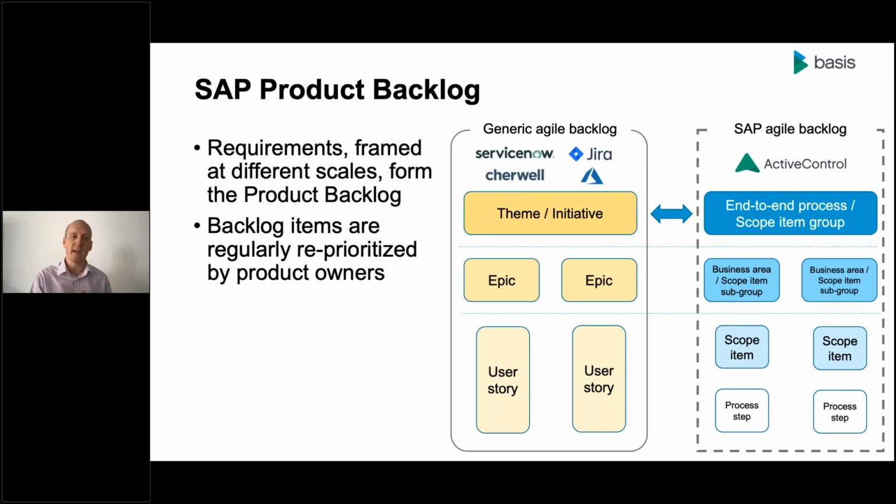And it's a really important aspect because it's doing that and breaking our needs down into those small user stories that lets us constantly reprioritize and focus on the highest priority in each sprint. If we have huge requirements, we can't be responsive and adaptive in that fashion.